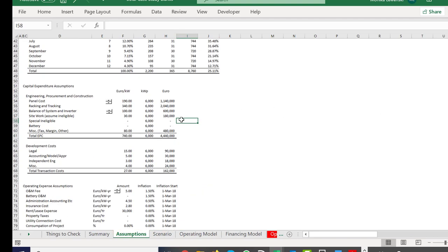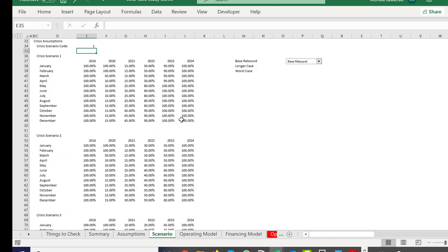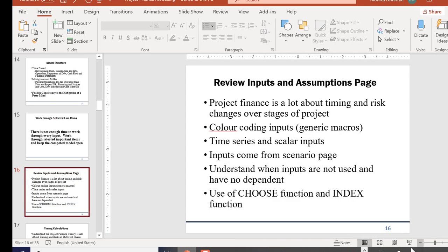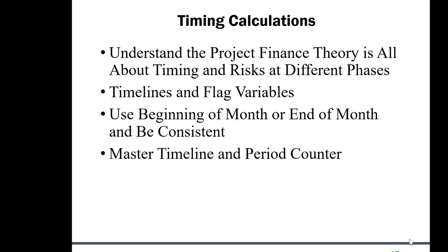We've worked through the inputs. Now I'm moving to the operating cash flow. I want to discuss timing calculations. In project finance it's all about hitting different dates and timings, and the risk goes down after you finish each stage. After the development period - getting permits, government approvals, feasibility, bank commitments - that risk is gone.